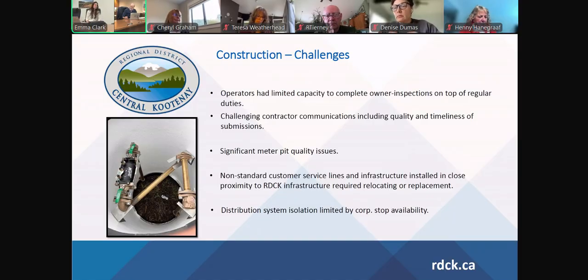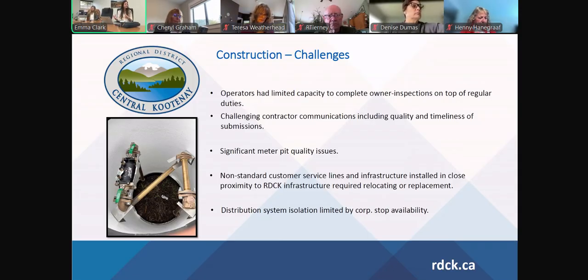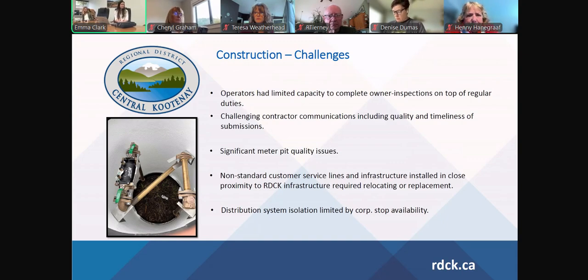Through the chair, I'll answer. As I understand, there's two questions here. Yes, phase two, which is fully grant funded through the provincial metering pilot project, does provide funds for site inspectors, this type of thing. So for phase two, yes, and this will be funded. Again, I have a question up to the province, so I can't speak wholly to it. There is one outstanding question, but yes, they do provide funds for that position. Phase one was not part of this grant funding. It was through other senior government grants and some reserves.